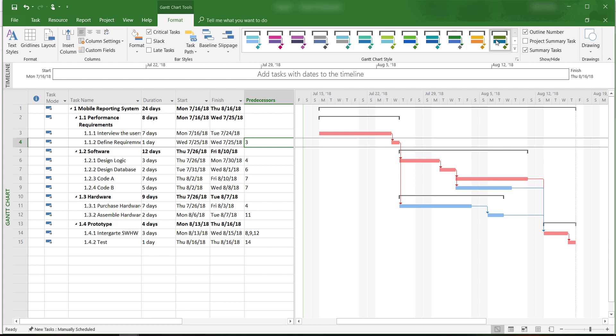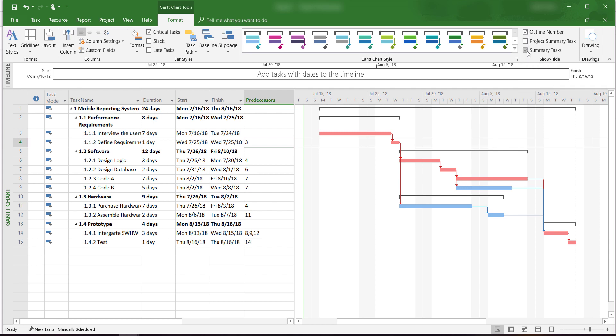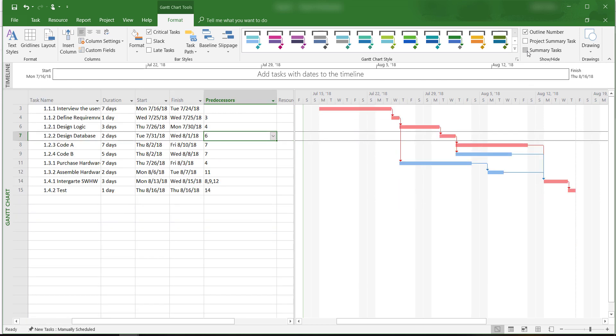We already talked about the outline number option. There is another useful option called summary tasks. If we uncheck this box, the summary tasks or deliverables will be removed from the work breakdown structure and we only see the lowest level activities remaining in the entry table and in the Gantt chart view.